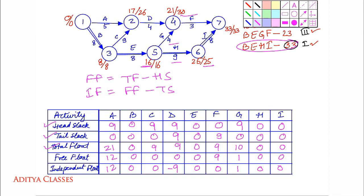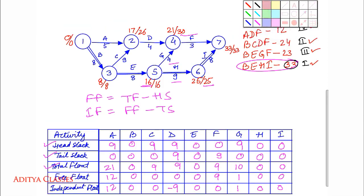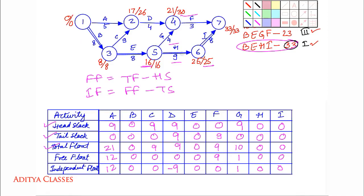So you can see once again that all critical activities B, E, H, and I, all these have zeros. There are no head slacks, tail slacks, none. Everything is zero. Because critical activities do not have any kind of leverage. They are stuck with the tightest possible schedule. Thanks for watching. Bye bye.